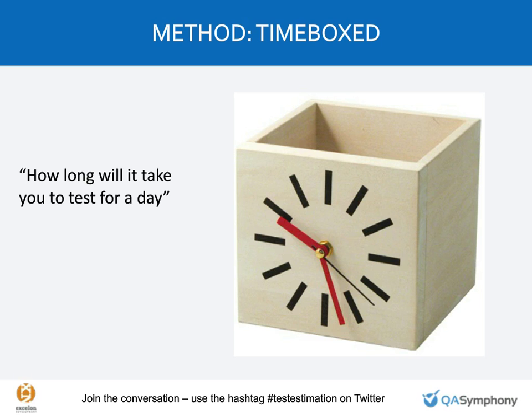How long will it take you to test if it has to be done by noon? Till noon, right? And this isn't necessarily bad. I can spiral outward, working from the highest priority to the lowest, if we can agree on what those priorities are, and stop whenever you want me to stop. It makes the decision super easy, and we don't spend a lot of time arguing about how long things will take.